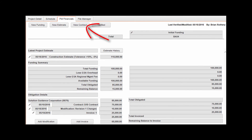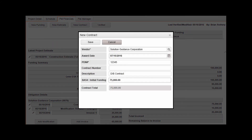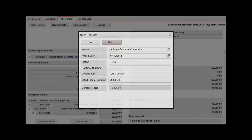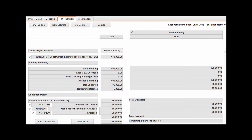Click New Contract in the toolbar. Populate required fields as highlighted and additional fields as needed, then click Save to continue. Repeat these steps as needed to record all contracts on the project. Contracts will be displayed in rows on the PM Financials tab. Once a contract has been created, modifications can be recorded by clicking Add Modification under the appropriate contract. Invoices can be recorded against a contract by clicking Add Invoice.